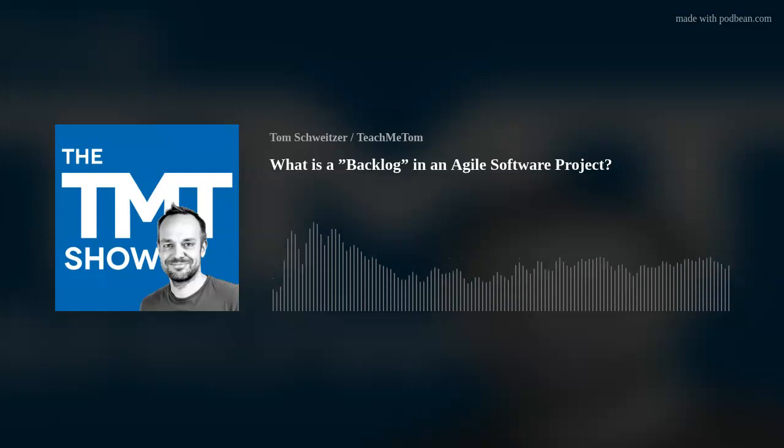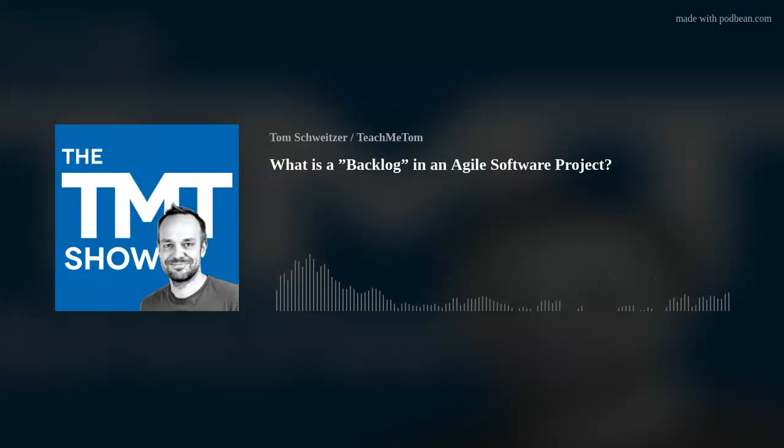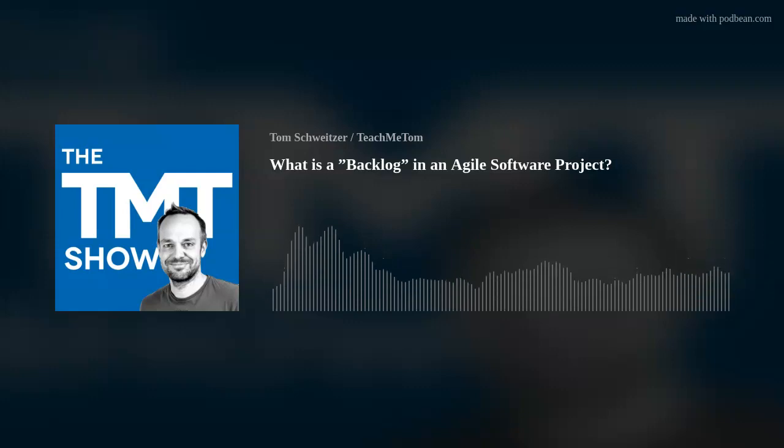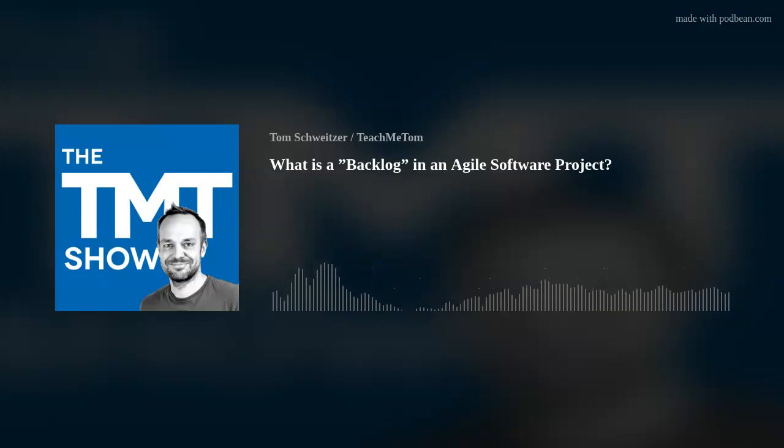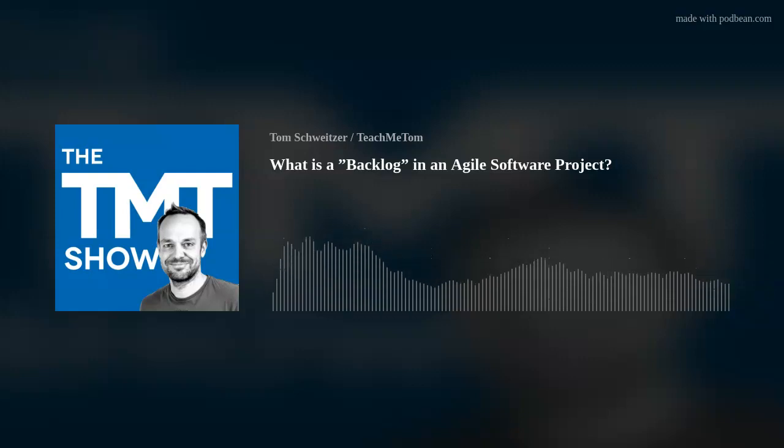So it goes into the sprint backlog. That's sort of like a separate list. And we take the user story out of the product backlog and give it into the sprint backlog. That means the team is supposed to be delivering this piece of functionality, this user story, in the next 2 week sprint. So at the end of the 2 weeks, we're going to take a look at it together and see what we have achieved. Okay, but we are at the beginning now, at the beginning of this 2 week sprint phase.